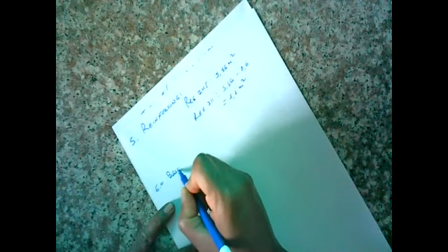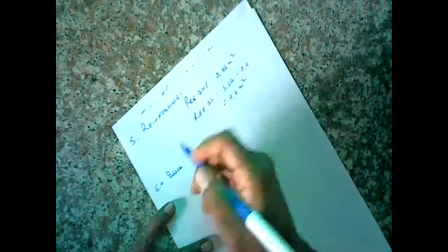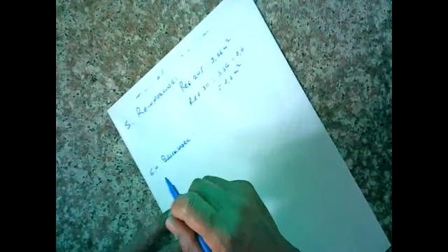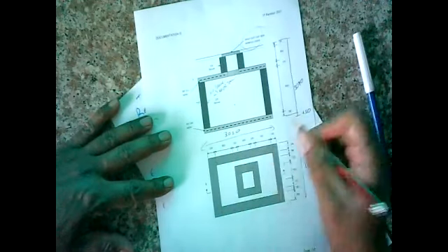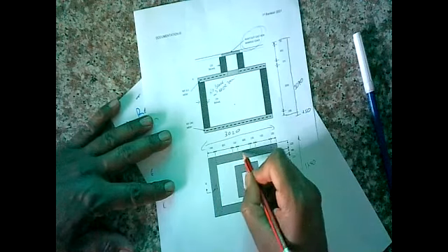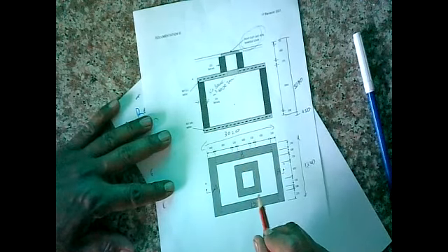Now let's look at brickwork. We put the floor on, we put the reinforcing, now we're going to put the brickwork of the walls, and let's get some quantities there. Notice also, if I were to break this up there and there, I'm getting panel A equal to A, B equal to B. And that's shortened, we're using the full length. You know what that is about from the last concrete reservoir example.